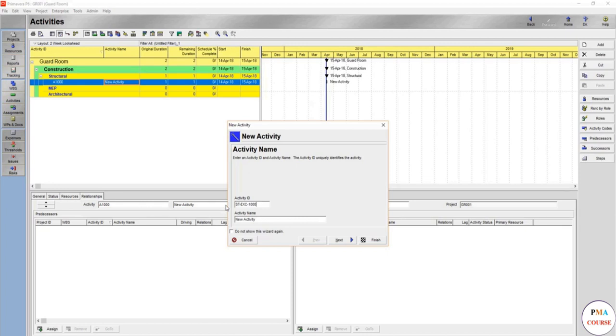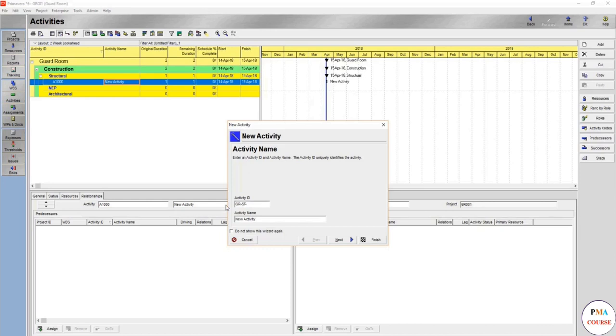You should always make sure that you are using the same codes and the same ID structure used by different projects in order to make a better coordination as overall organization. For the sake of this, we are going to make it just GR as for guard room structural works, then we are going to make it 1000 to make it easier for us.